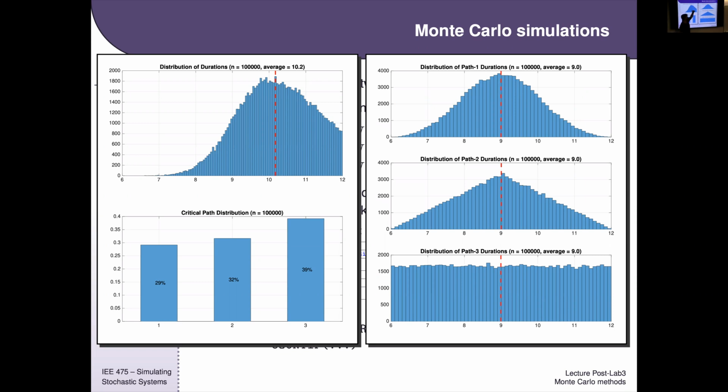So when I'm taking the max of all 3 of these, then regardless of what good luck I get here, I might have bad luck here. And if I do happen to have good luck here, there's still a good chance that these are going to be greater than this. So the max operation creates this unfortunate situation where it's going to naturally push the mean higher.